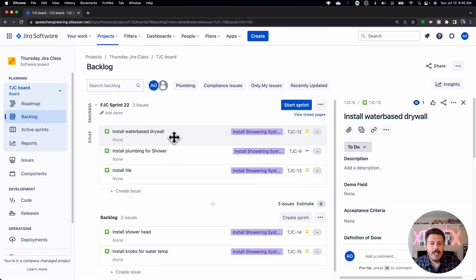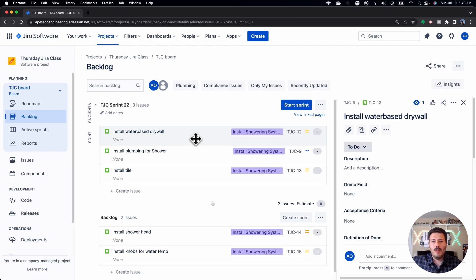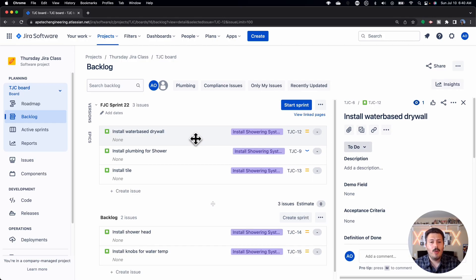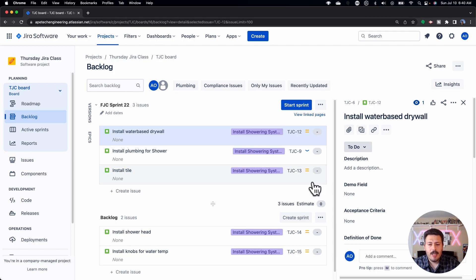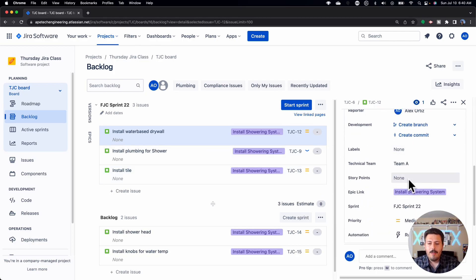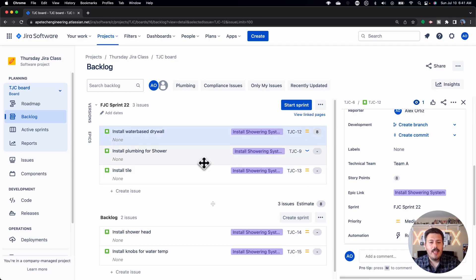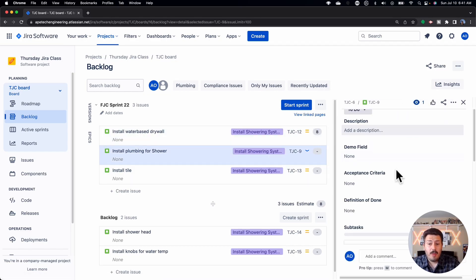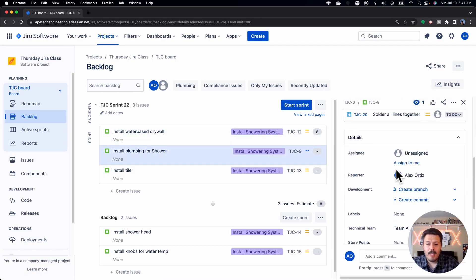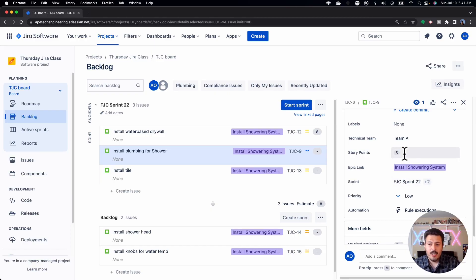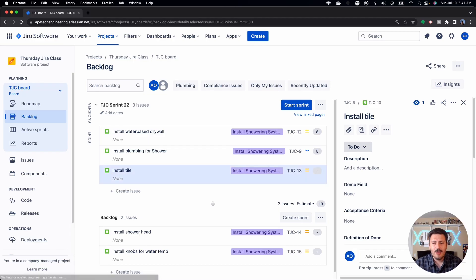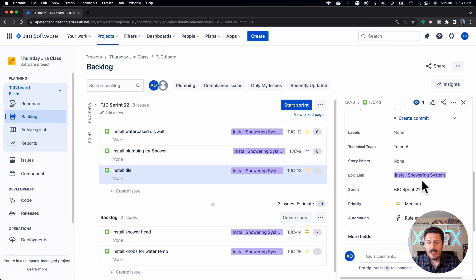Once you're in here as a Scrum Master, I'm usually the one that's driving the meeting. I'm usually the one that has my hands on the keyboard and mouse. I'm in the meeting room with everybody else, and everybody's kind of providing guidance with respect to the story points and estimation. So you want to come in here. You will see that you have a dash. These are unestimated stories. And so the second you start coming into the right-hand side here and you go to your story points, you can put in your points. And essentially once you put it in, it'll show up over here.